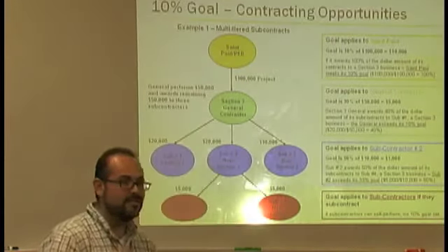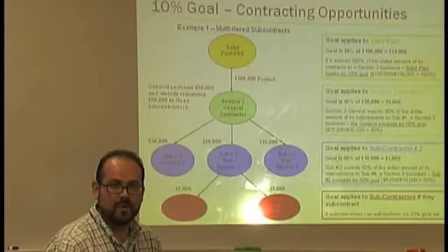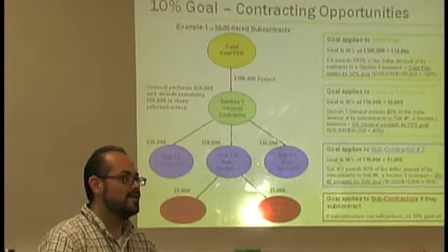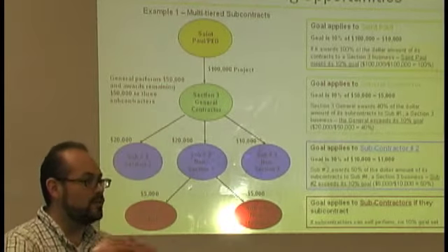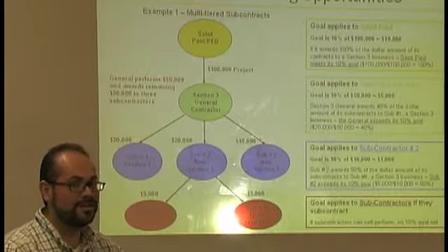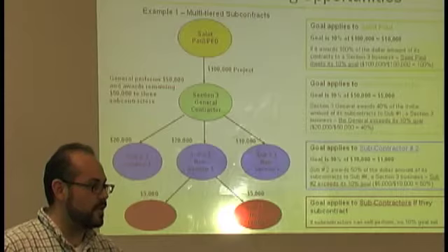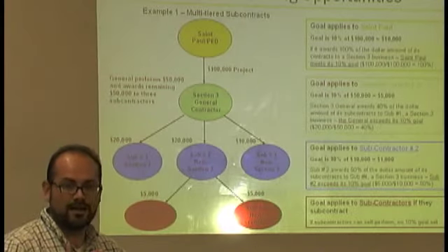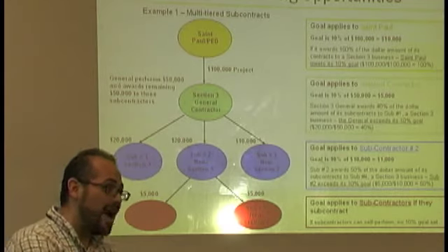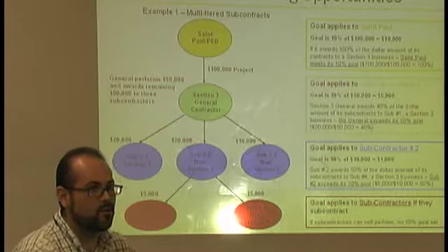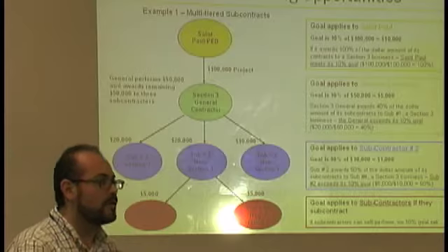One of the benefits of being Section 3 certified is you receive a bid preference. Okay, that's an amount that your bid can get a little bit higher than the lowest bid. And we've already seen that have pretty dramatic results with the first 20 houses that were issued. In fact, of those 20 houses, all of them were awarded to Section 3 businesses. So you don't have to be a Section 3 business to do this kind of work, but it helps a lot. So get on that list.